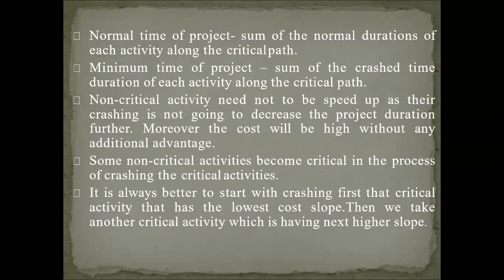Then minimum time of the project. So this minimum time is the sum of the crash time duration of each activity along the critical path. So what are the crash times of each activity along the critical path? That is called minimum time of the project. That can also be calculated very easily. There is not much difficulty there.